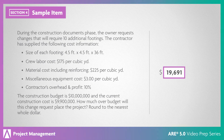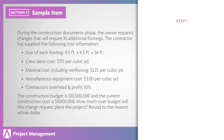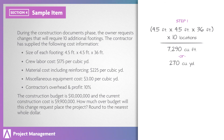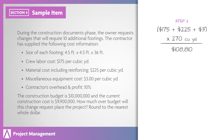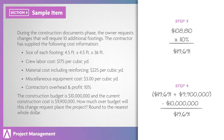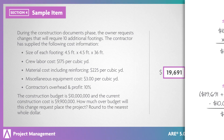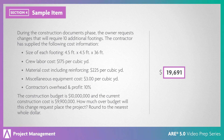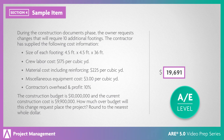The correct answer is $19,691. The owner's requested modification will increase the current construction budget. The architect must first determine the total cost of the requested change — specifically, the total volume of the additional footings, then the total cost including labor, materials, and miscellaneous equipment costs. The contractor's overhead and profit must all be included in the increased costs. The total cost of the additional footings and the current construction costs must then be compared to the construction budget amount. This is an AE-level item because it requires you to analyze the information given and calculate the increase in labor and materials compared to the current project budget.